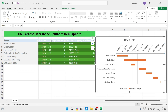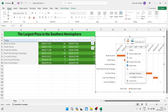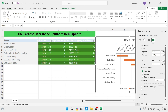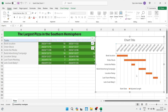Next, right-click the date axis again, go to Format Axes, and scroll down to Units. Under Units there is a Major and a Minor value. The Major represents the number of days between each line on the chart. Currently it is set to 10, representing 10 days. Since we're working in weekly increments, change it to 7 and hit Enter, then close the panel. You can see it's a little bit more legible with each step.